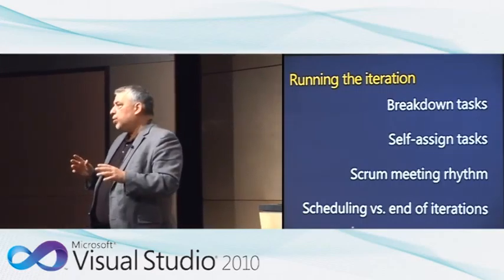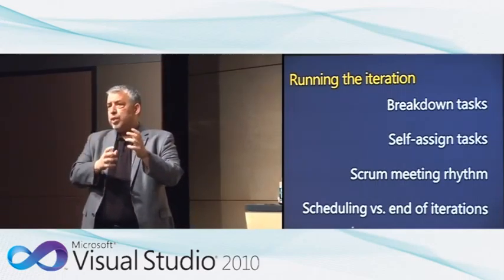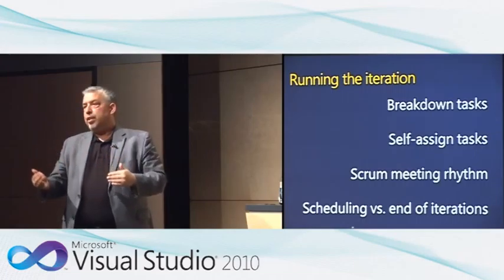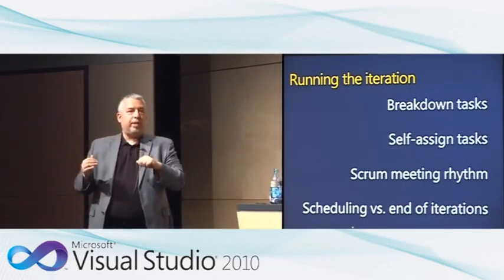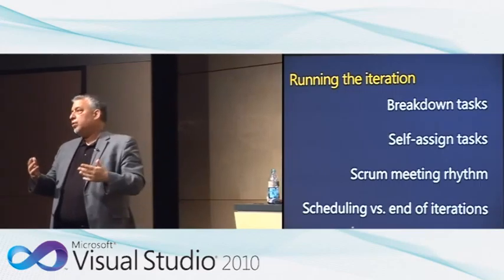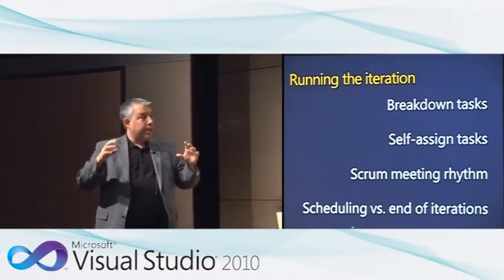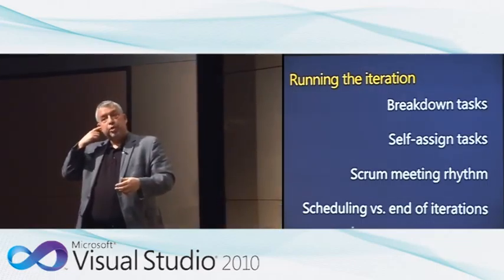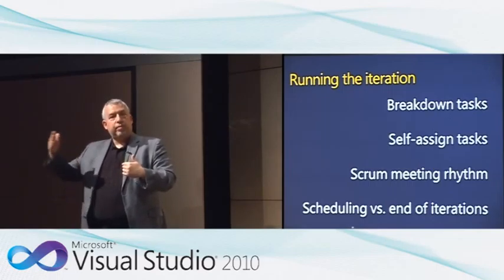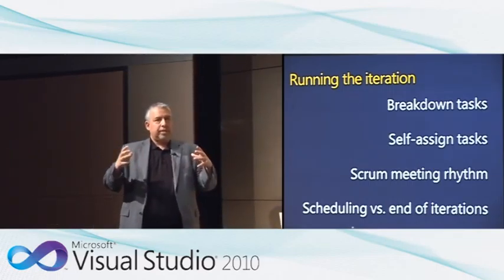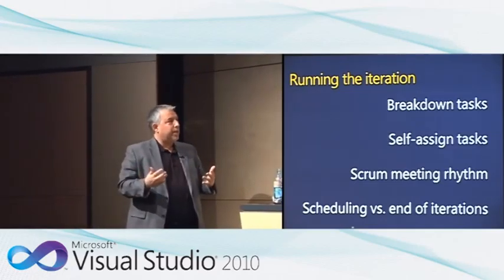We need also to decide on our Scrum meeting rhythm. Like Scrum, basically, we're looking at development, people who are mostly committed to that one project. So a daily meeting makes a lot of sense. In the context of a change project, we find the tax of the daily meeting might become a bit heavy, so the team needs to figure out its own rhythm. So that's one of the places where you adapt a little bit, maybe every 2 days, twice a week, every week. So depending on the effort and the speed at which you're going, you'll adjust your rhythm based on your average length of task. And again, these are not things that I can just work on. I need to book people, I need to do other things. So there's a slightly different rhythm that will change by organization.